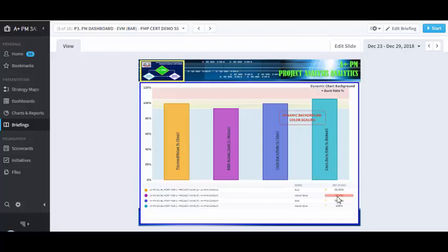So when we scale down here, we actually see that it automatically color codes those metrics when you scroll over it to tell you the disposition. So you as a project manager, your primary focus on any metric that's being reported is yellow and red, right? That's where you should be expending your time, because it's telling you that that metric in comparison to the plan is not performing as you projected it, right?